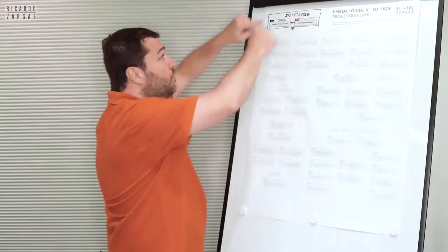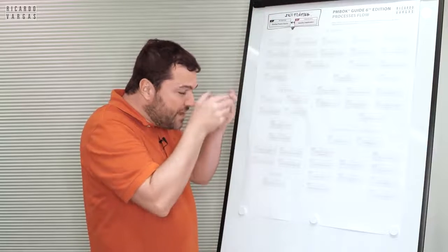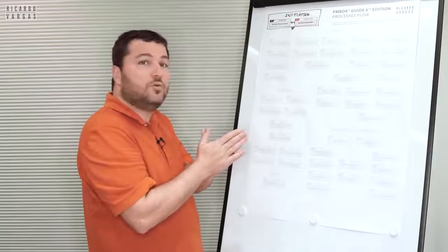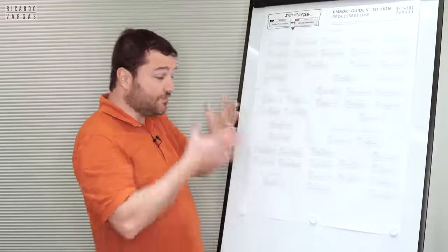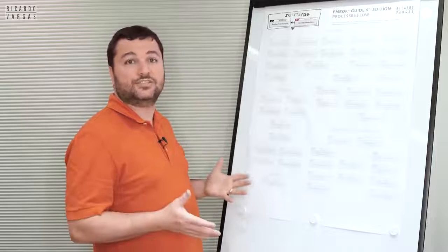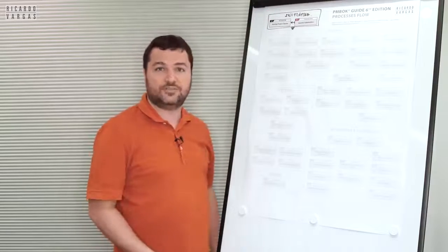So when you have the initiation, you have your project charter, this very light, slim document that just addresses what your project will do, and then a list of who your stakeholders are. This is the initiation of a project.